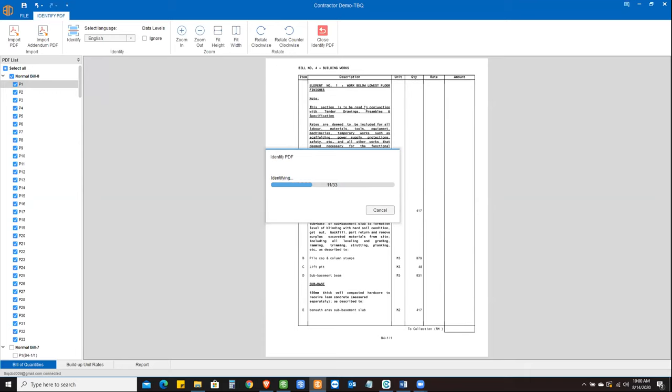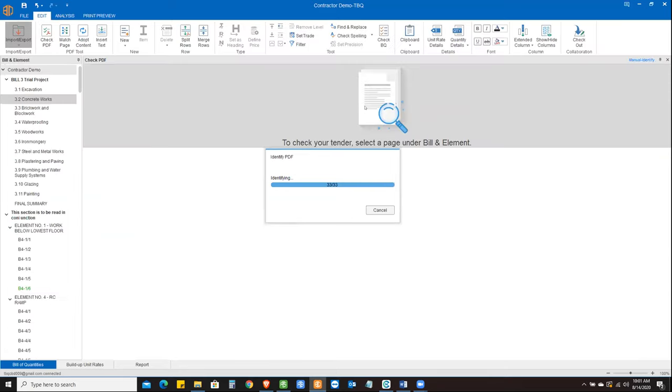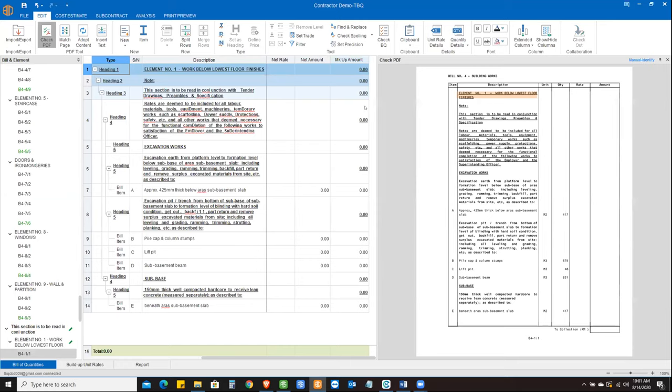And then it will give us the access to calculate the quantities, different quantities that I want, and I can do the comparison between quantities. I can then put in my rates, work out everything, and then it will fit in back to this format while I would like to send out to the consultant client. So that's really, really in detail calculation-wise when it comes to electronic BQ. Now, what's so important about importing a scan PDF BQ is that you don't have to go through the hassle of writing it down or maybe referring back and forth. You don't have to do all of this stuff.